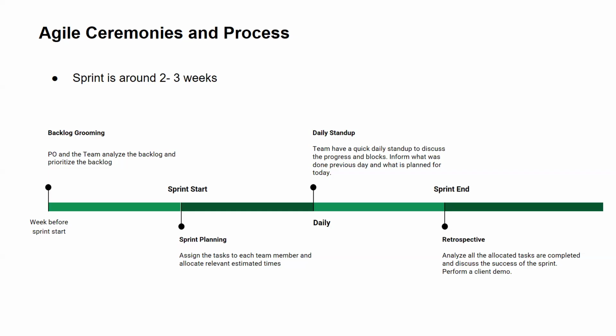We will have a meeting and determine what we are going to do during this sprint. This is the estimate for each and every task. This much effort is needed for this, and this person will be doing this specific task. The other person will do that specific task. Like that, we will assign each and every task and do estimations as well.